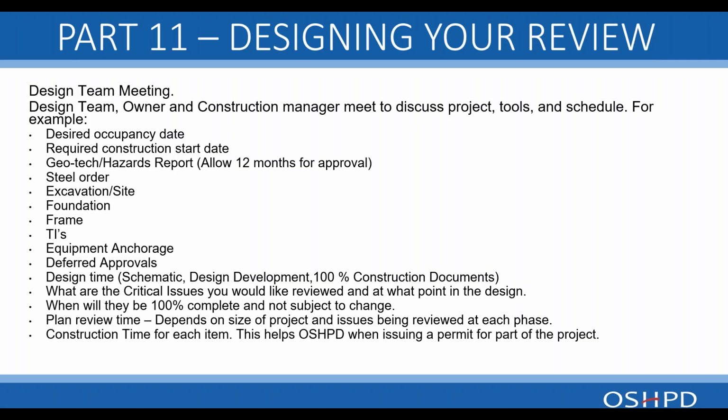For example, desired occupancy date, required construction start date in order to meet that occupancy, the geohazards report to make sure that's done on time to start the plan review process, when does steel order need to be done, and make sure the plan review is at a point where the steel won't be changing due to comments, excavation of site when that needs to be done in order to get the foundation poured on time, and so on and so forth.